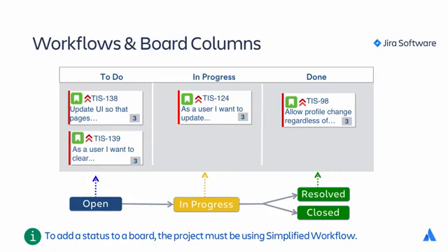Jira Software boards are tied to the underlying workflow of their projects. The top shows the sprint board in a Scrum project. The bottom shows the underlying workflow. The workflow statuses are represented by, or mapped to, columns. Issue cards are moved from left to right as they progress through the workflow. The goal is to transition from the leftmost column of a board to the done column. Note the connection between columns and workflow statuses.